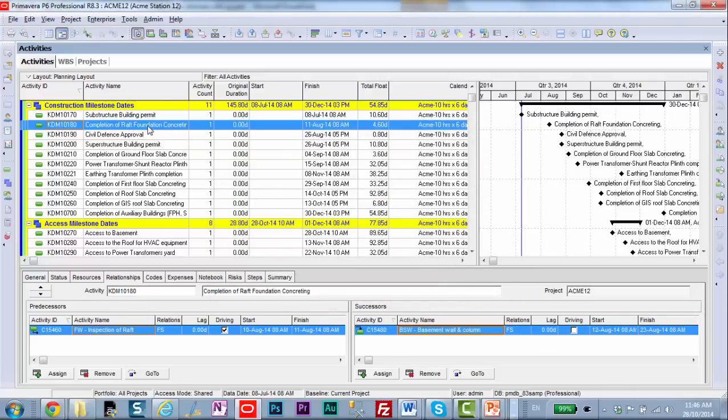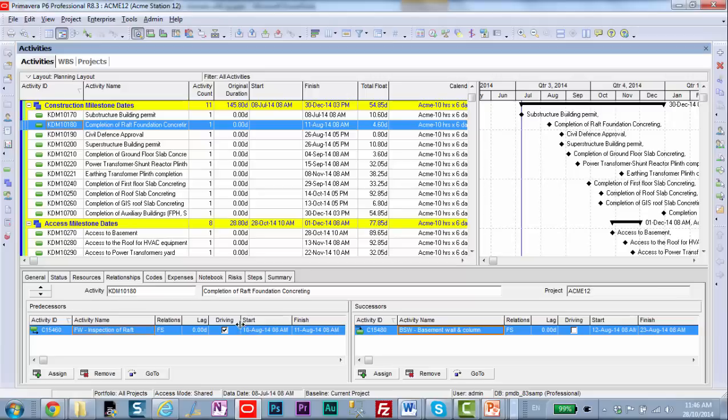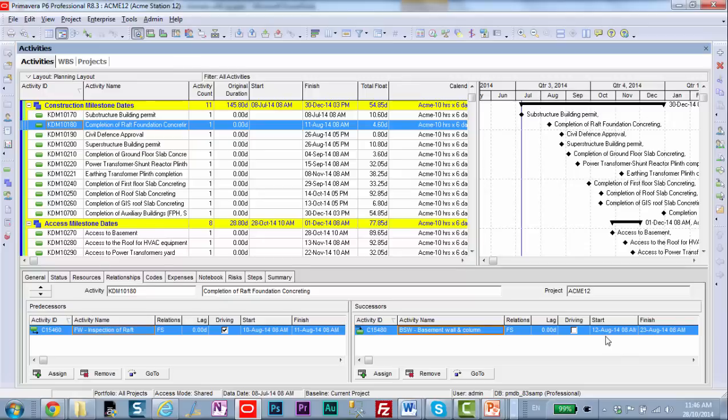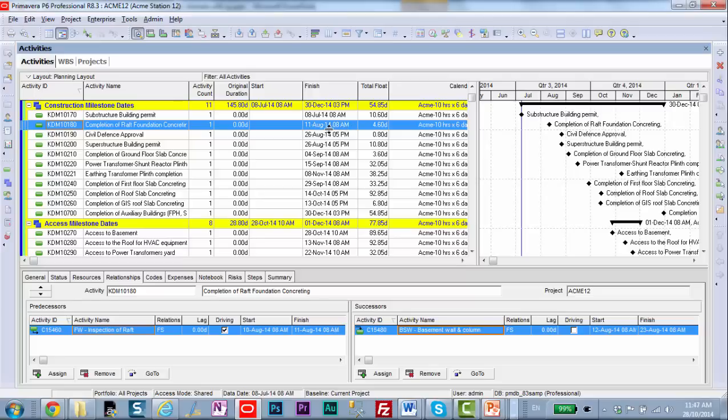Here we have the completion milestone for the raft concreting. The incoming predecessor is a driving predecessor. That means that this finish date on this activity, August 11th, is forcing this activity to get its own August 11th finish date. However, the successor here is not a driving relationship. The successor doesn't start immediately after. In fact it has a one day lag. This is August the 12th, whereas this is August the 11th. Putting these columns up here allows you to do some really quick analysis.